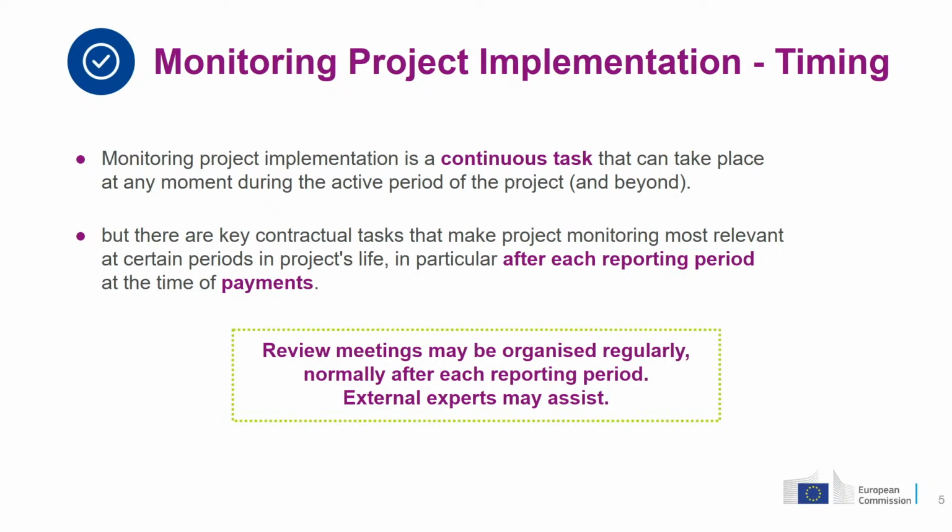The project implementation is a continuous task, and as such, in order to monitor, you need to constantly be up to date and provide the information that is required. But there are specific periods in the time of a project where reporting is more relevant. For example, in particular, when it is required to submit the periodic reports after the end of each period. And these are linked also with payments. Review meetings can be organized regularly. Normally they are organized after each reporting period, but this is not necessary. It can happen also in the meantime. And as we said already, sometimes due to the technical expertise required, the project officer can be assisted by the use of external experts.